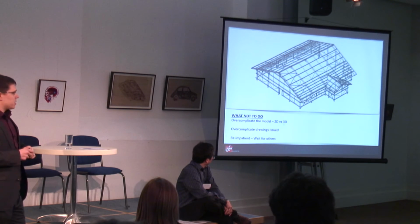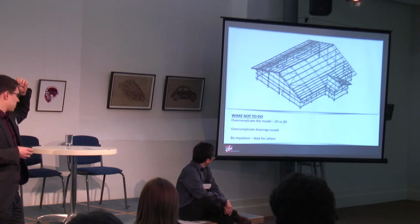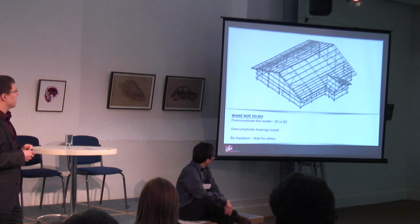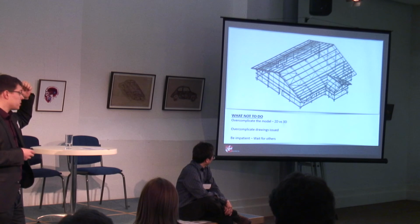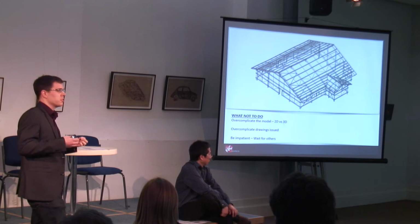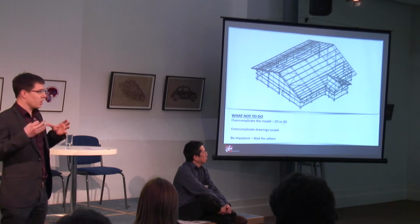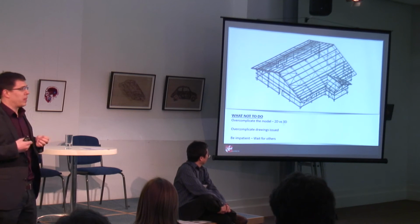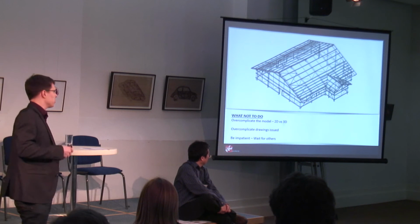Biggest thing with BIM, when you're collaborating, is this: this was a Motorrad dealership that I did at the same time as Ferrari, and on this one we actually used the contractor's steelwork model and put it into our model. I'm doing the same thing on Porsche at the minute, and I'm tearing my hair out because I can't progress the drawings as much as I want to, because I've got to wait for the steelwork to get their information in. I could quite easily model that steelwork, but again, it's wasting my time long term because it's going to be overwritten by the steelworks.